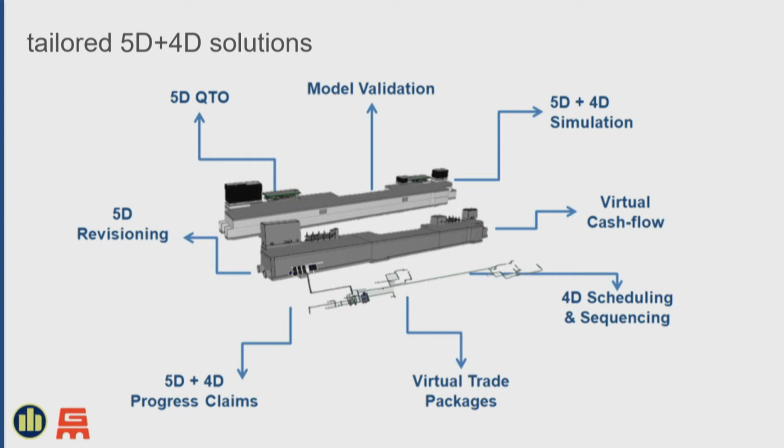There's a lot of concrete that goes into these. There's a lot of finishes that goes into these as well. So in 1 week, we managed to produce everything that you see on screen. So straight up from 5D quantification, we extracted as many model quantities as we could from the models. Then we started to look at revisioning, how we would actually run this over and over again.